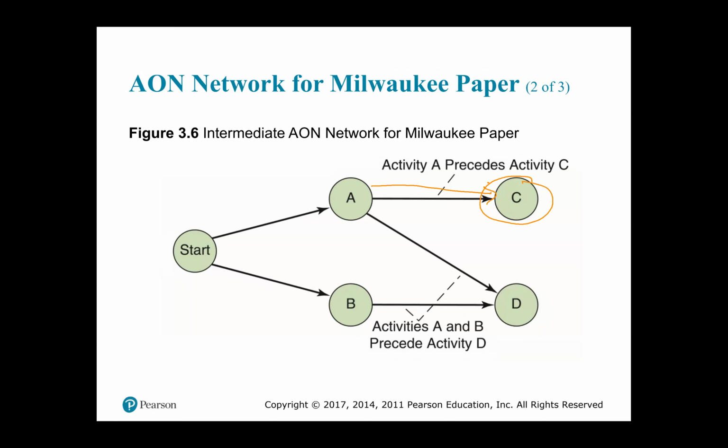You continue on. If you look at your document again, at the work breakdown structure in terms of the table, when you look at activity D and go across to the immediate predecessor listing, you will see A, comma, B. What that means is that activity D cannot be accomplished until activity A and B have been accomplished.